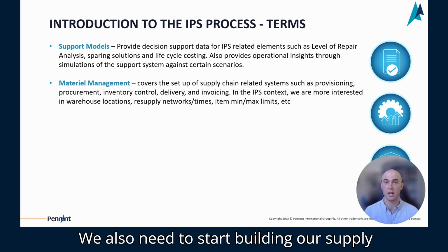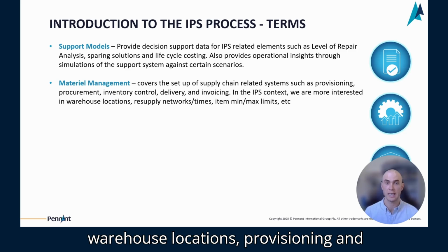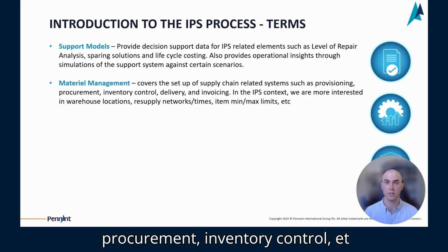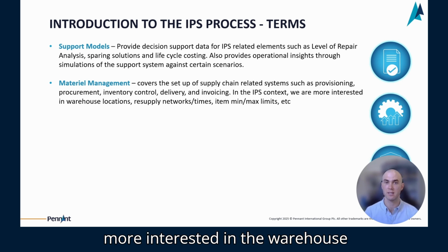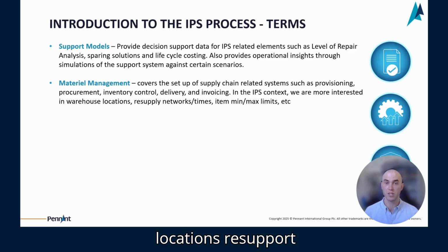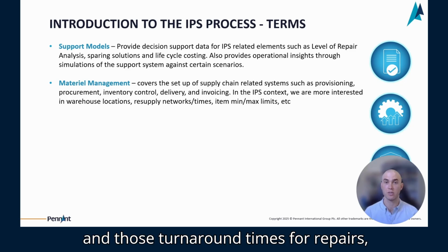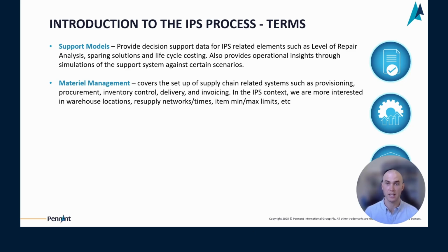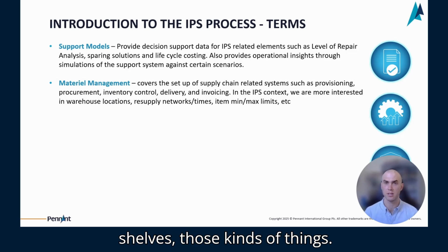We also need to start building our supply support solution. We are talking about warehouse locations, provisioning and procurement, inventory control, etc. For IPS itself, we're probably more interested in the warehouse locations, resupply networks, and those turnaround times for repairs, potentially item min-max limits on shelves, those kinds of things.